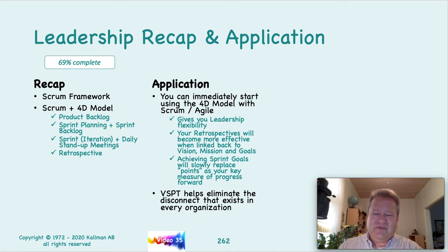I am very much leaning towards not doing planning poker, okay, and doing no point planning, because the teams that I've worked with where we've done the points and then not the points, we save maybe 10-15% in overhead administration. And over the length of a development project, that adds up to a lot of time.